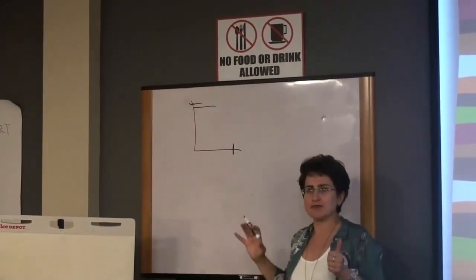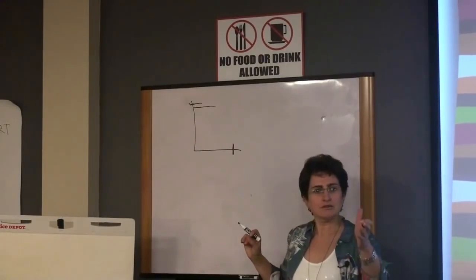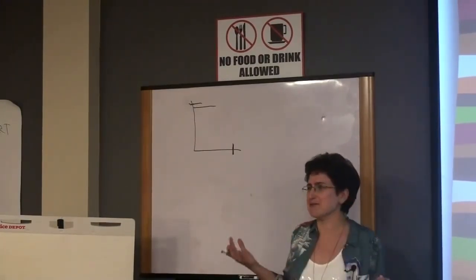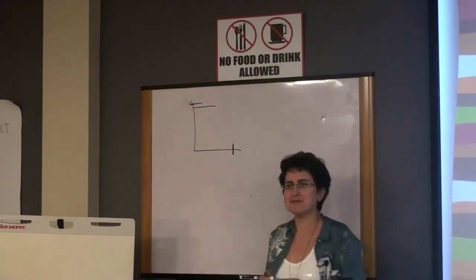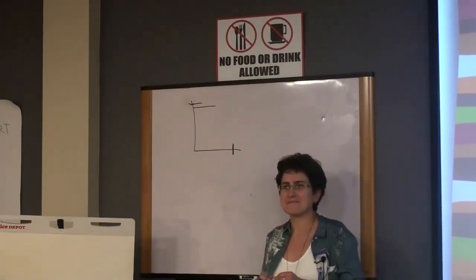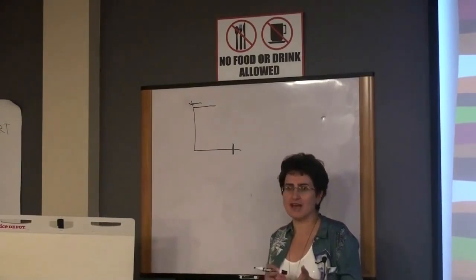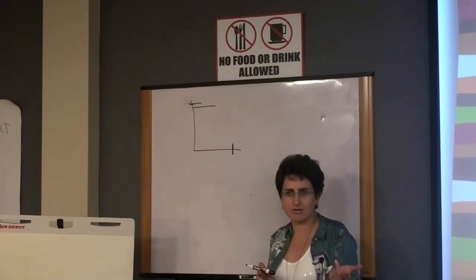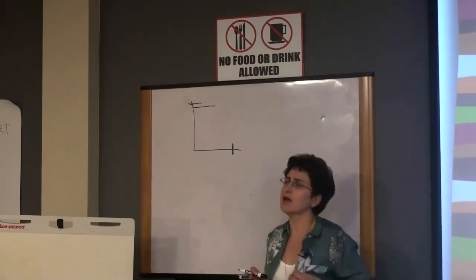So what else may be the reason? Vacation. Everyone went for vacation, so why did we even start the sprint? Good reason. What else? Awaiting supplies needed. Yes, you may not have the hardware delivered in time. You may not have the licenses for whatever software you need coming in time.